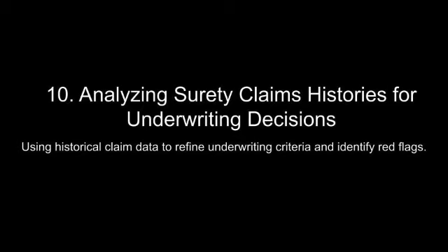defaults and claims. Insurance principles intersect with suretyship, although the two are distinct in function and purpose. While insurance transfers risk, suretyship is a credit arrangement where the risk remains primarily with the principal. Understanding this distinction is crucial for stakeholders. Regulatory bodies like the National Association of Insurance Commissioners, NAIC, provide guidelines and standards that govern surety practices, ensuring the solvency and reliability of surety companies.